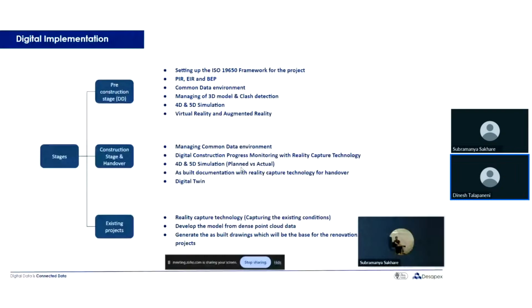And the common data environment is very important when you're working on BIM, because you have multiple stakeholders or consultants working on a single project, and you need to have one common data environment to manage all this data. So it's very important to set up a common data environment and explain in detail how information has to be produced, managed, and shared between the consultants, and what permission levels and all other things. And then comes managing the 3D model, clash detection, coordination, 4D and 5D, and virtual construction.